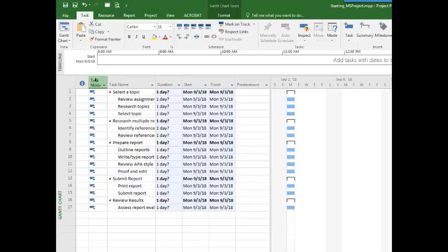This column task mode refers to the automatic and manual. This symbol here represents automatic, so that means we are doing automatic scheduling. If we come over here to the right under what is the Gantt view, you'll see that all the tasks line up. Since right now, since we have not scheduled them or set the precedence of these, all the tasks end up happening at the same time. That's why they all line up the way they do.